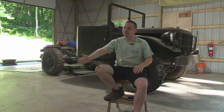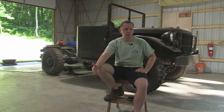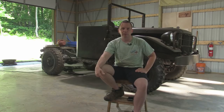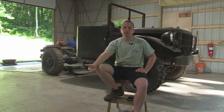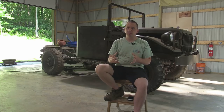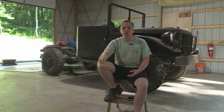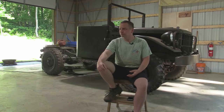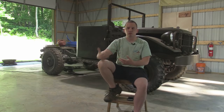So after months of wasting the county's time trying to file for a variance and having to get a hearing date and all this stuff, I finally get somebody on the phone who knows what they're talking about and they're like, wait, what do you want to do? After I explain it to them, they say, oh, you don't need a variance for that. You're good to go. It's just little things like this that I wish. And at the very least, if they weren't going to provide any kind of service, maybe they could have had some kind of education process up front, because a lot of time was wasted just waiting for things to happen that could have been in motion sooner.